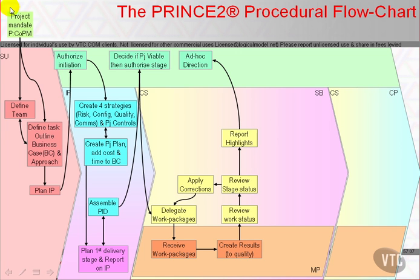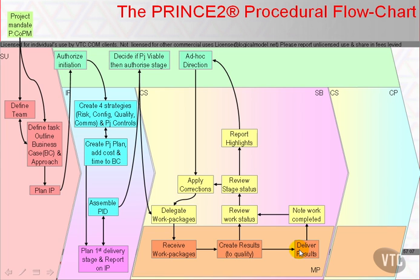On receipt of highlight reports, the project board may choose to apply direction to the project, resulting in corrections, even to the extent of stopping the project if they feel that is appropriate. The team activity will create the results that are to be delivered by this stage, and raise notification via configuration management to inform the project manager's day-to-day routine. That routine includes several potential actions, one of which is to delegate further work packages within the current stage plan's scope.